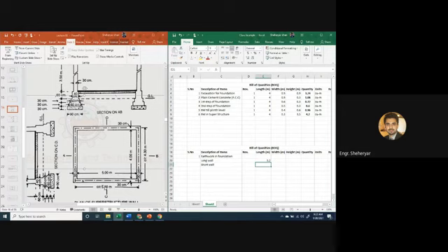5.2 is the center to center length of this horizontal wall. So for the short walls, we have to subtract the half thickness from one side and half thickness from the other side. It means that we have to subtract the full thickness of the wall from the center to center length of the horizontal wall. Is it like this? Yes, sir. So 5.3 minus 0.9.